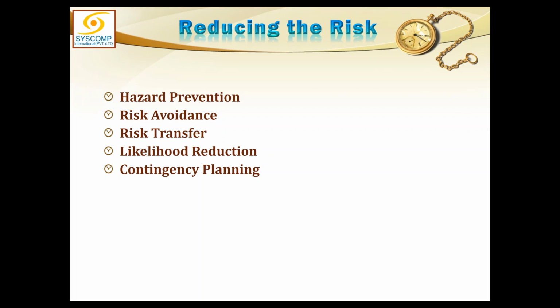So they decide to leave this factory there and move, say, 30 kilometers away from that location to a remote land where there is no population, and establish a factory there. So there will be a loss associated with it. They will naturally be spending a lot of money doing that, but at the same time they have saved their business and avoided the risk of closing down. Am I clear about these things?